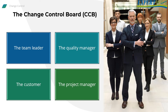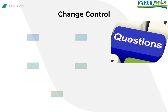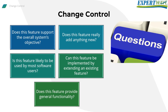Sometimes we need to add extra people to the CCB, like the developer implementing the feature, the graphic designer, or the technical writer. Key evaluation questions include: Does this feature support the overall system's objective? Does it add something new or is it simply an alternative way of doing something already supported? Is this feature likely to be used by most users? Can it be implemented by extending an existing feature rather than adding a new one? Does it provide general or very specific functionality?